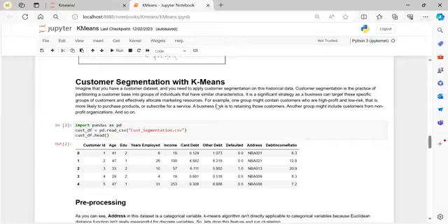Whatever model is running in production, we will be on standby, monitoring whether everything is working fine or not. If after 1 week there are a little bit of hiccups or problems that come up, we will resolve them. And after a week, when everything is stable, we will wrap up and give them all the documents, all the manuals, all the training, everything, the way they expect us to hand over that particular solution. And that's how the project wraps up.